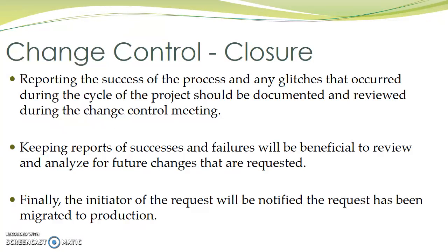Closure. Reporting the success of the project and any glitches that occurred during the cycle of the project should be documented and reviewed during the change control meeting. Keeping reports of successes and failures will be beneficial to review and analyze for any future changes that are requested. This way, a log of any new test cases that should be presented in the future can be assured to be added to the test plan. Finally, the initiator of the request will be notified that the request has been migrated into production.